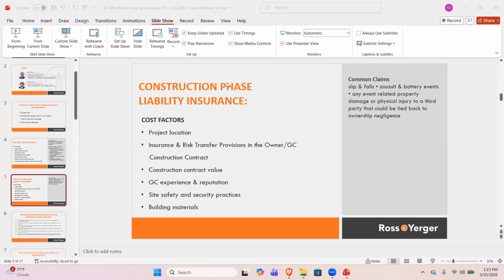Let's see here. Michelle McGuire has a question on thoughts on wrap ups, either owner controlled or contractor controlled wrap ups. Where we're seeing the win on that, Michelle, is that typically the larger the project, it's a way for us to bring cost efficiency to the project, and we certainly advise the owner controlled program. You can get that OI policy basically embedded into that wrap policy, and it doesn't cost you near as much as the two animals independently.